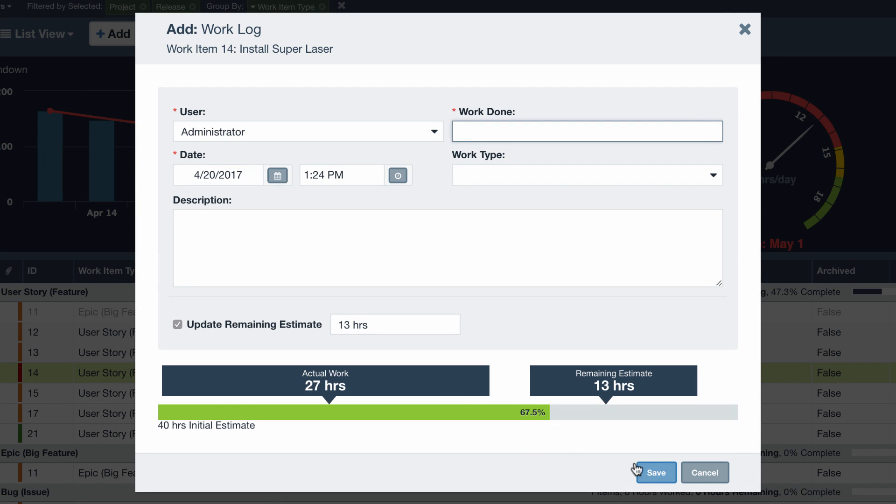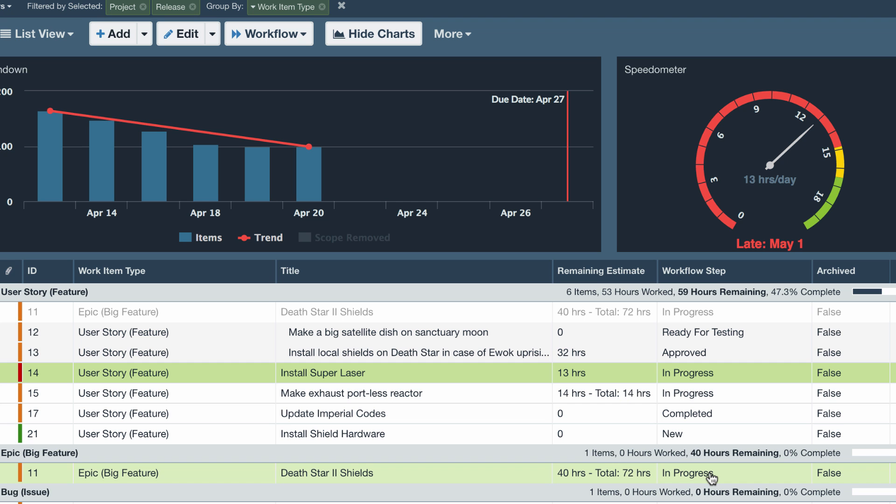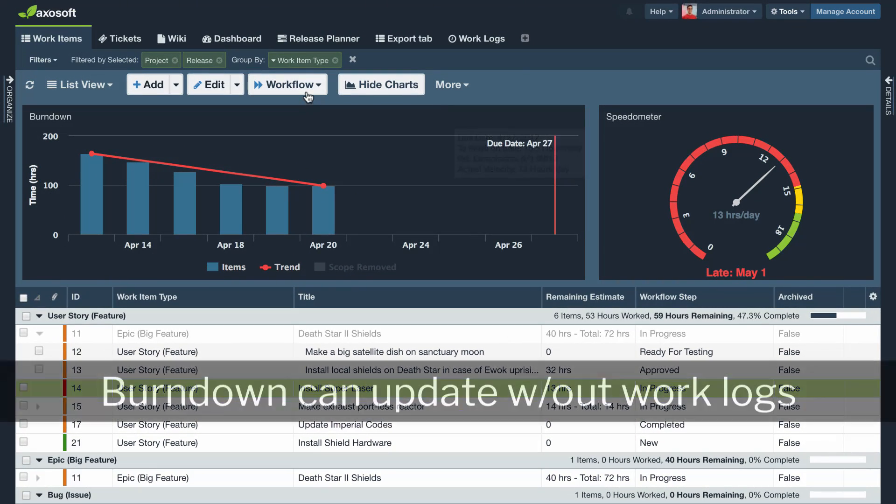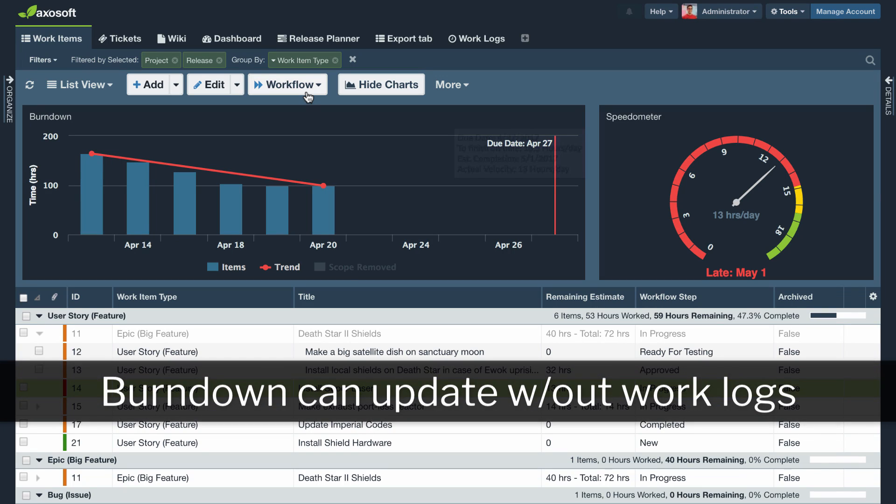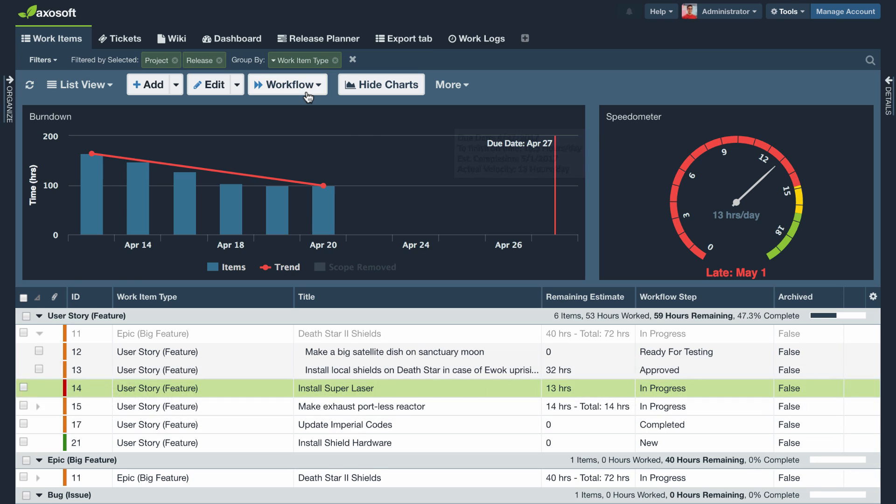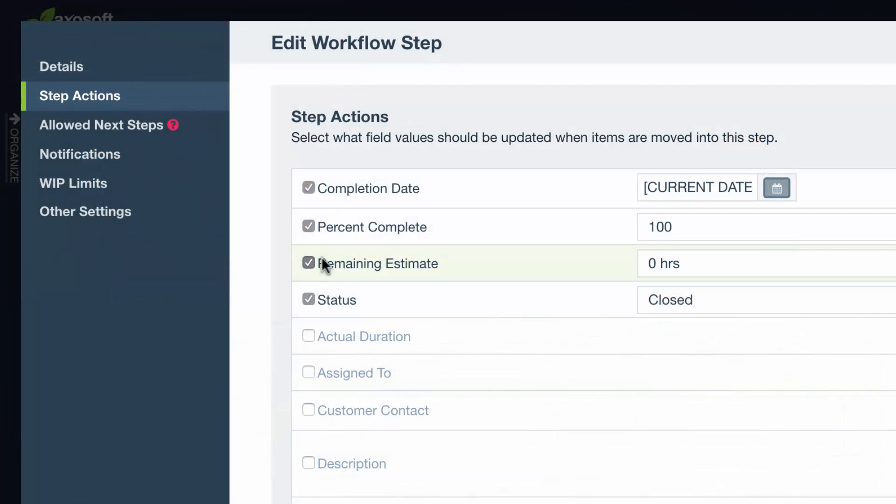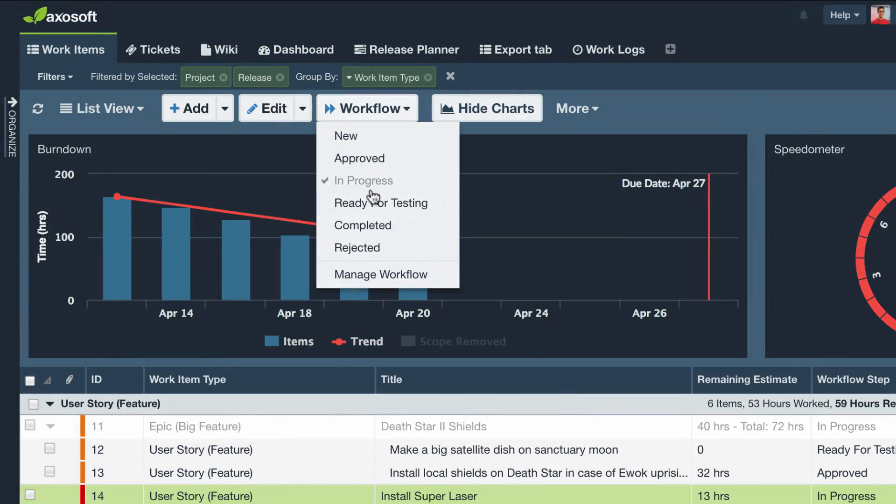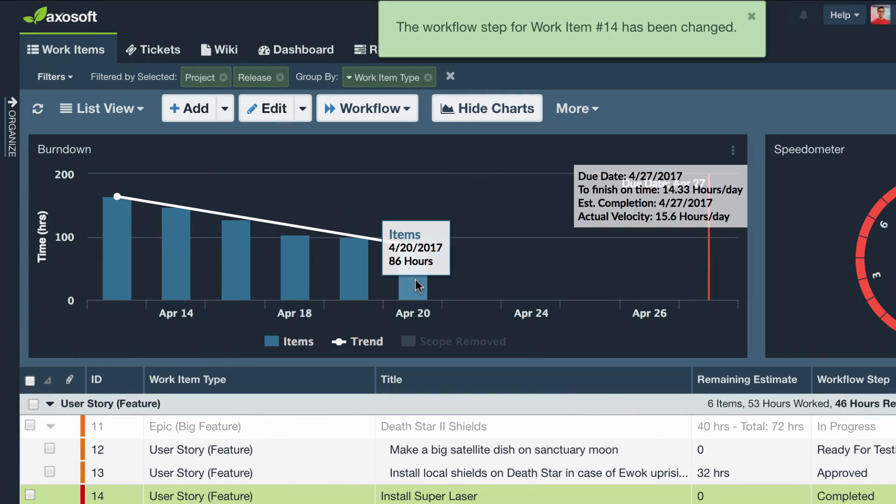In version 17.1, the burndown chart has been updated, allowing for any change to the remaining estimate field to update the burndown chart. This means that you can use a workflow step action to automatically update the remaining estimate value to zero and then have that update reflected in your burndown chart.